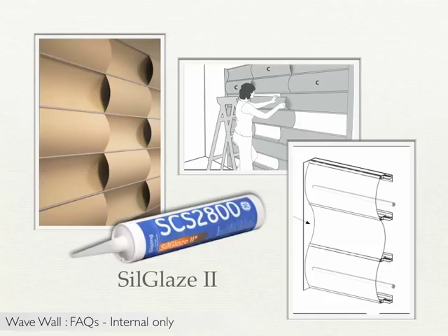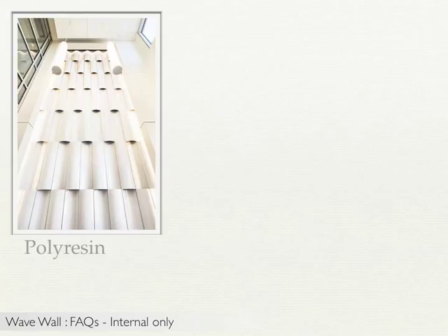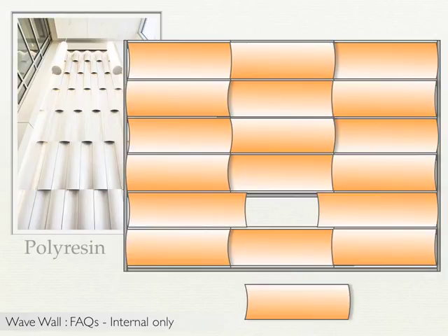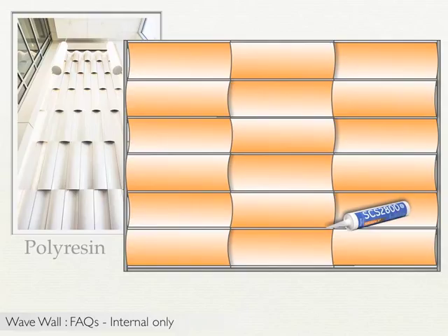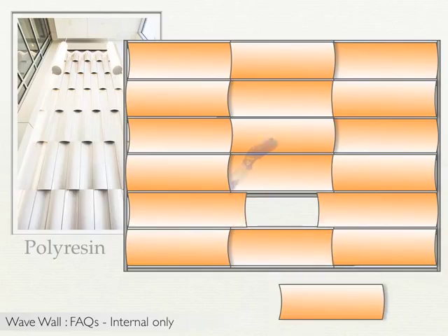This adhesive will work as it should with all of our materials except for polyresin. However, even when used on polyresin, this adhesive will make the channel tighter, and despite the lack of true adhesion, would make the tiles more difficult to remove. Furthermore, if the client needs to remove the polyresin tiles, it would work to pull the tiles out, cut off the dried silicone, and then apply new silicone to replace the tiles.